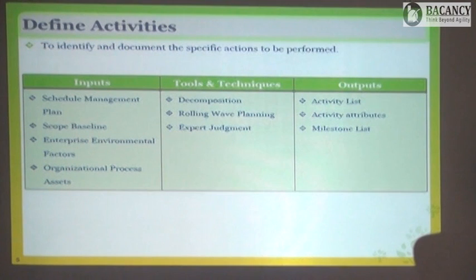So what is a mandatory dependency in this example? For mixing both items, boiled tomato and prepared spices should be there. Absolutely. And before boiling tomato and preparing spices, first we need to buy them. Absolutely correct. That is a mandatory dependency. Critical path? No. We are not coming to critical path. Just focus on what we are covering right now. Mandatory dependency means the work is such that you cannot proceed with your successor before you complete the predecessor. So first you have to buy tomatoes, then only you can boil them. This is a mandatory dependency.